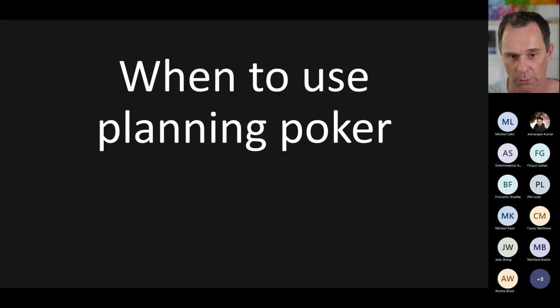Planning poker works well when you've got just a few stories to estimate, 5 or 10 stories. I like to do it. We have backlog refinement workshops once or maybe even twice per sprint for an hour, maybe an hour and a half, where we're discussing all the new requirements. And we spend the last part of that workshop estimating those requirements that we just discussed while they're all fresh in our memory. So maybe a 1.5 hour bi-weekly backlog refinement session, we'd spend the last 20 or 30 minutes.